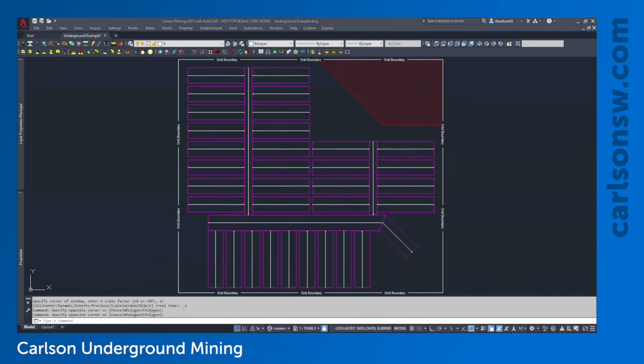So these panels are now defined, and we could actually start jumping into the timing, but there's a few other things I want to talk about as far as ways that we can edit the panel. So a rule that we get into with the calculation of the timing is that when a piece of equipment begins mining a panel, it has to mine it to completion before it can do something else.